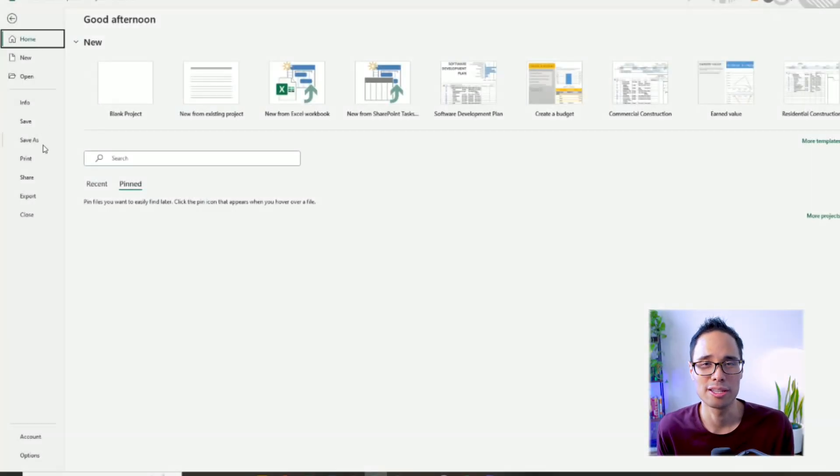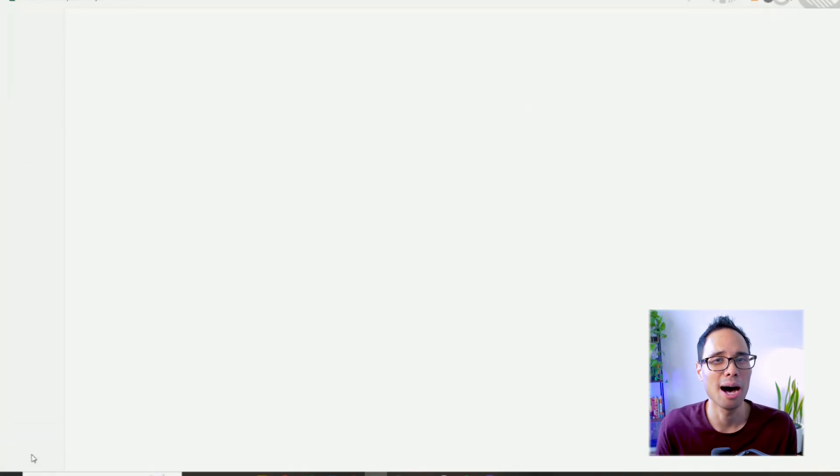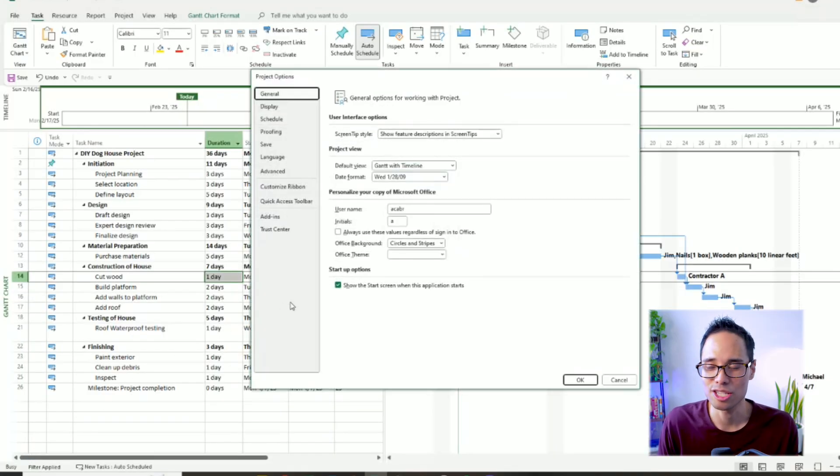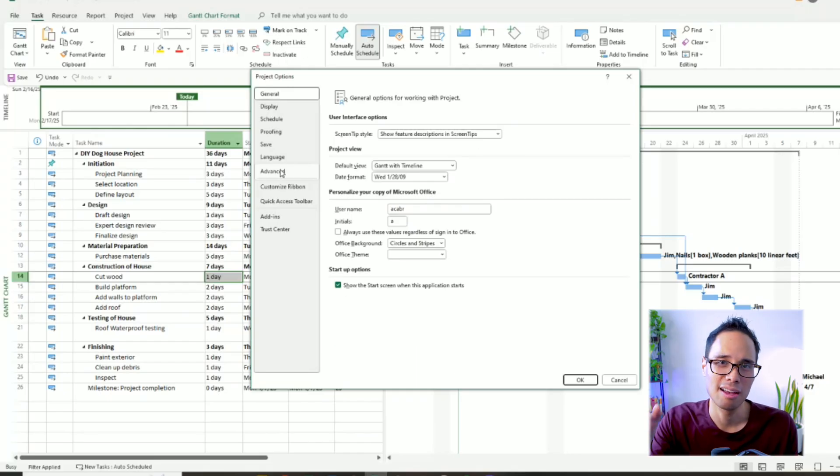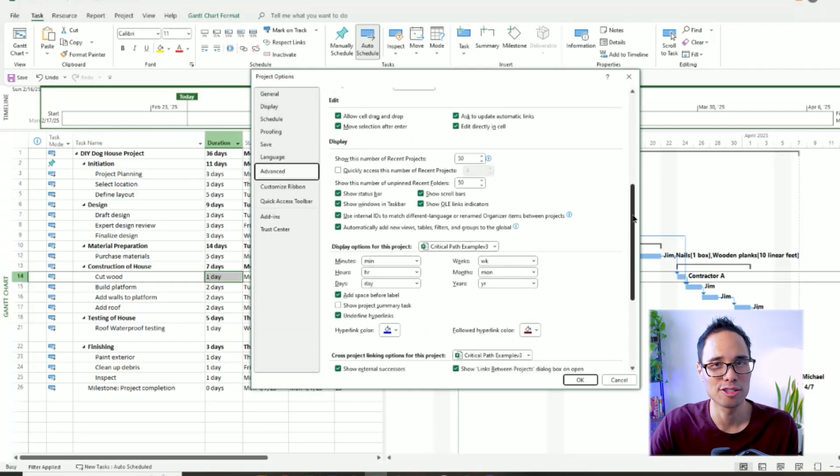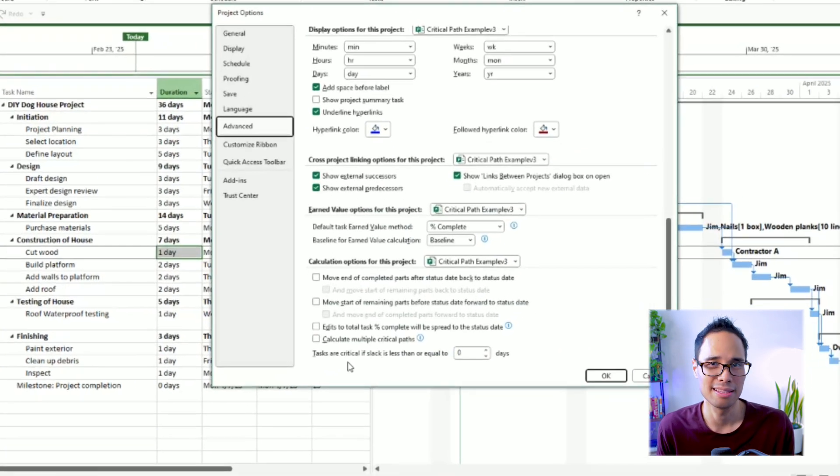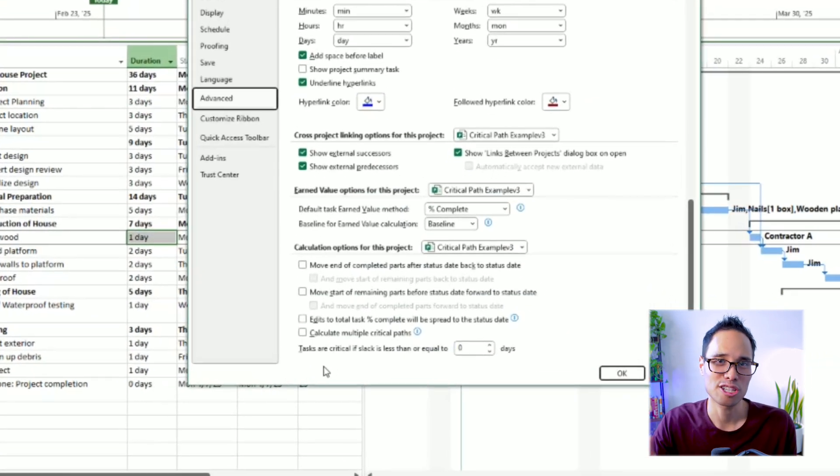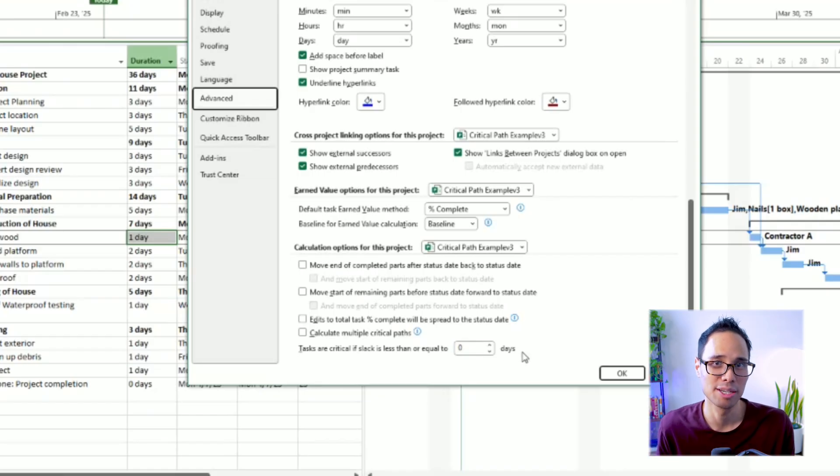Oh, and one more thing, to make sure your critical path shows up correctly, you must verify one setting in your software. Move your mouse to the top panel, click on File, and at the very bottom, select Options. In this new pop-up window for project options, click on Advanced on the left-hand side, and then scroll all the way down to the bottom. You'll see a line that says this: Tasks are critical if Slack is less than or equal to zero.